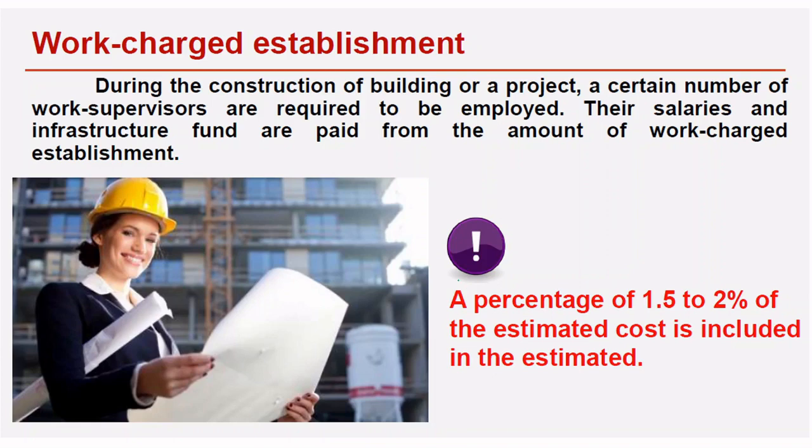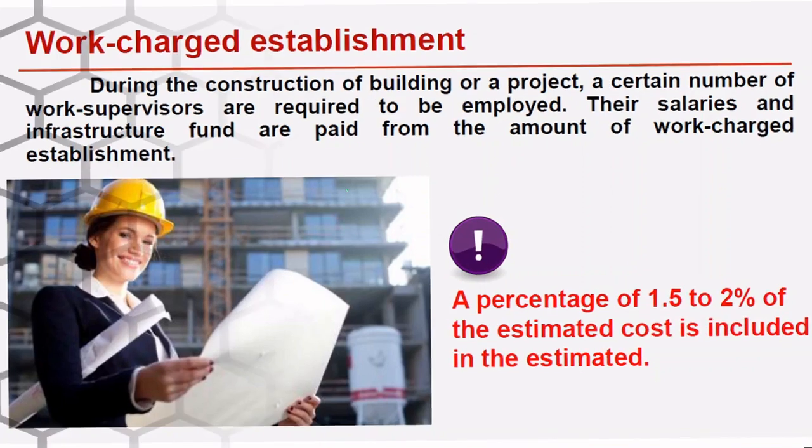So what is that? They give in your estimated document a percentage of 1.5 to 2% of the total estimated cost, which is already taken from you if your estimate is approved by them. Okay, so that they can pay the salary for their supervisors who are involved in your work.